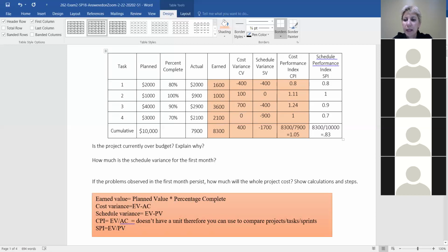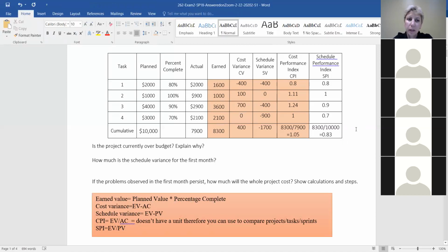Thank you. That's good. So in terms of a schedule, what's happening here? I forgot how to word this one, but I think it's like for every dollar we spend, we are only doing like 0.83 days worth of work done or something like that. I don't know. This one's weird. It's all dollars. It's not talking about days. For every dollar you had planned to accomplish, you accomplished 83 cents. Your plan was to accomplish $1. You accomplished less. Yeah, that makes sense. Thank you, Austin. You did very well. Along with your friends, you have completed this.